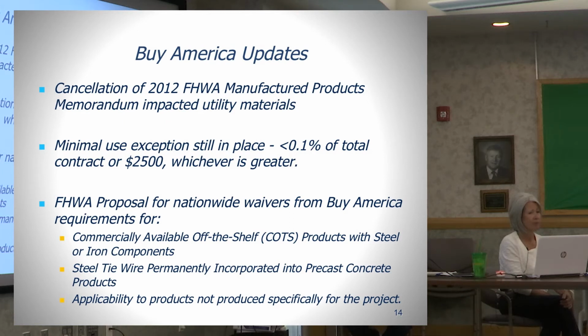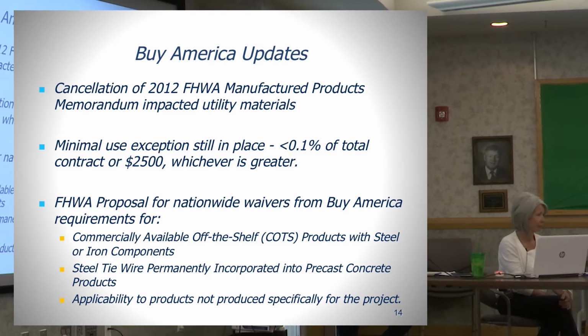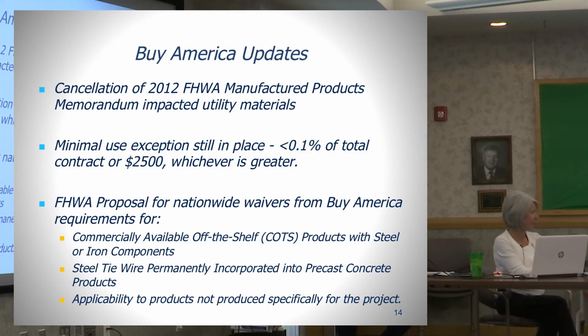Yeah, I was going to add to that, Patty. If it's commercially available, and it's not a hardship situation, they're not going to grant a waiver for it. Reinforcing steel is one of those things that's easily obtainable, so I don't think that's ever going to happen. Okay, I just thought I'd ask because they're wanting to use them, and it's a higher cost to go recast an element you've got sitting there. Right.